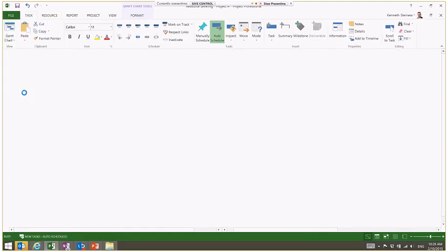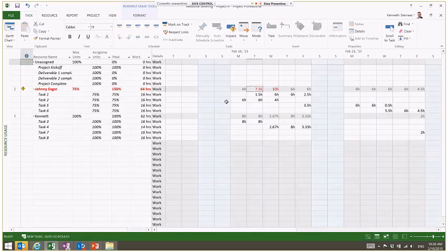So now, instead of working 12-hour days Monday and Tuesday, which is how it was set up before, we're asking Johnny to work one 7.5-hour day and one 10-hour day. So that's a lot better, I think, than what it was before. If you think back to the slide earlier, I said we're either going to eliminate over-allocation or we're going to try to minimize it. In this case, we're choosing to minimize over-allocation because the sponsor said that it wasn't an option for us to move the date. Okay?